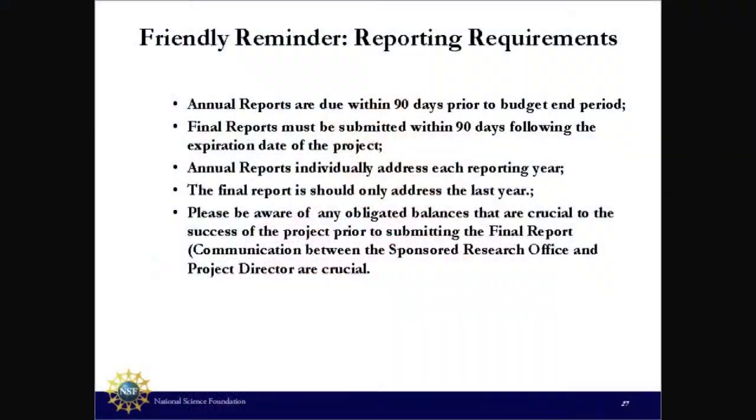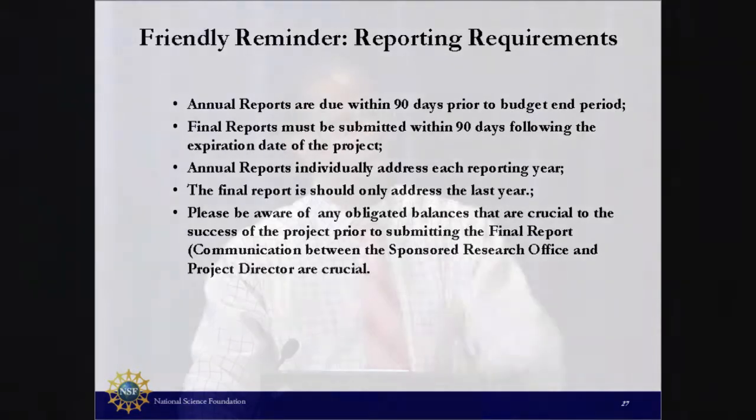And this is so important. Make sure you get your reports in on time. It will delay everything. You'll be amazed how many phone calls I get, especially at the end of the fiscal year. Oh, well, where's my award? And I'm saying, well, there's an overdue report. Well, I'm not even on that report. Well, guess what? Your co-PI is on another award. You need to contact them. And this is what happens. Nothing. It could be really minor things that you may want to get done, like a change in PI, things of that nature. Nothing. Everything stops. And it is so important.